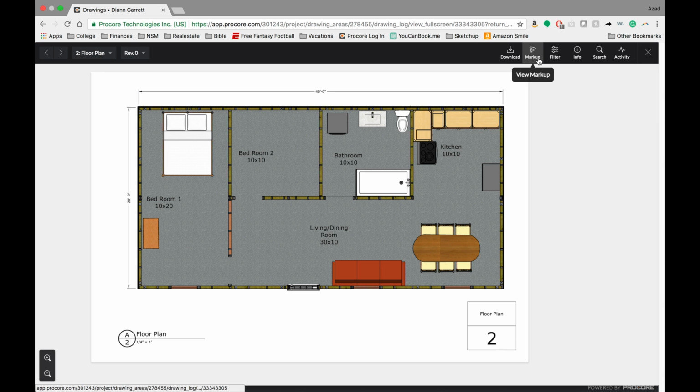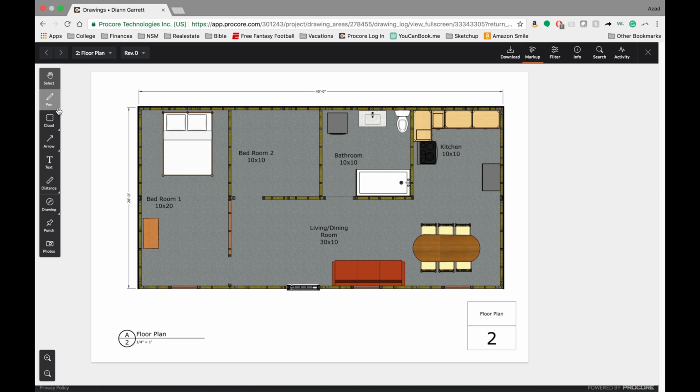Okay guys, I wanted to talk about one of the best features of Procore drawings, the markup tool. And so from here, what's really nice is you can link all of the construction project management stuff to the plans. So for example, you can link other drawings, text boxes, RFIs, punch list items, and photos, all to correlate with the plan. So if you ever don't know where this punch item is, then you can find it on the plans and reference the plans to get the exact location.